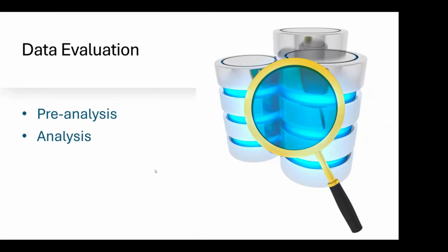So next couple of steps, you have your pre-analysis and your analysis. So the pre-analysis, you can use doing queries of the systems. It's advisable to assess the state of the data, at least at a high level. Consider all the data from the first exam stored, or at least the one that's in scope, including any exams stored prior to or without DICOM modality worklists. So in other words, if you have a whole bunch of exams that were manually entered, trying to understand that. Looking at outside exam importing and identifier localization procedures.